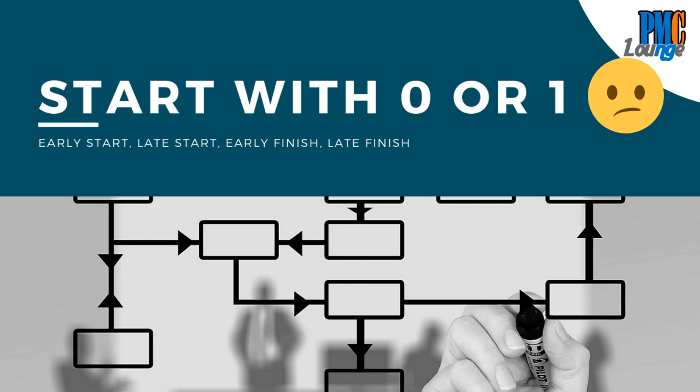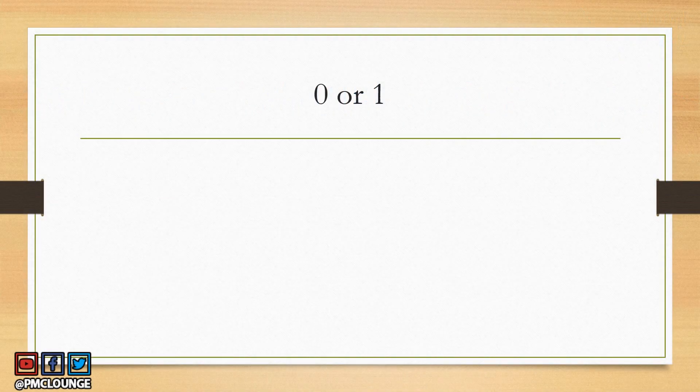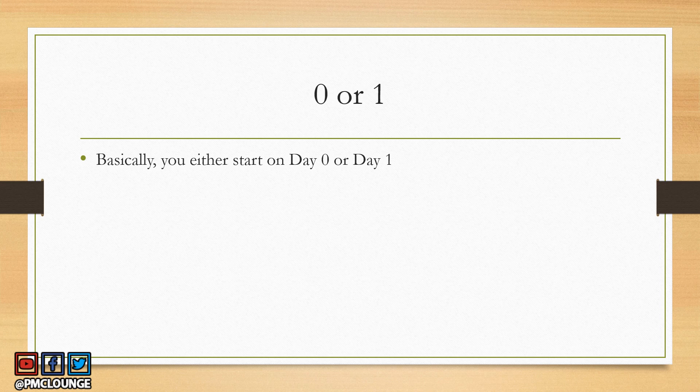One thing we did not cover yet is that there are actually two ways to calculate the early start, late start, early finish, and late finish values. It all comes down to whether you start with zero or one. When you look at a network diagram, whether you start at day zero or day one is going to change everything, including the formula that you use to calculate those values.